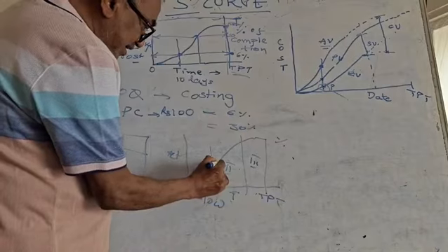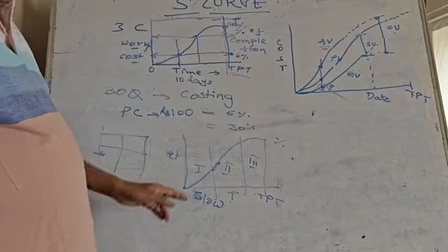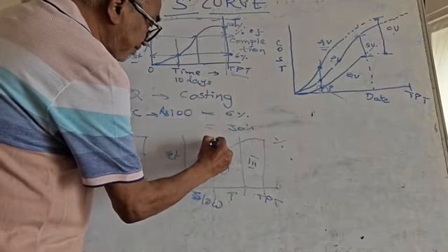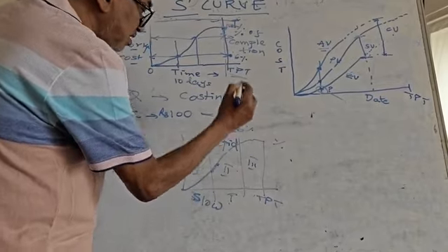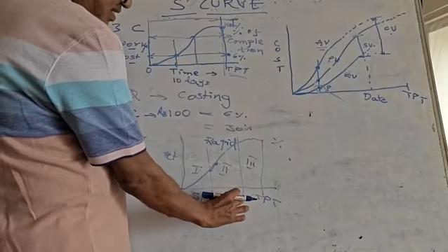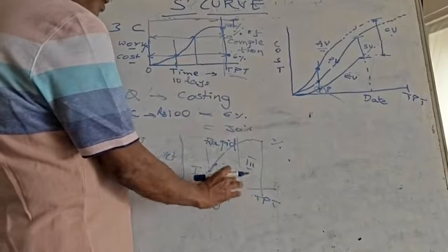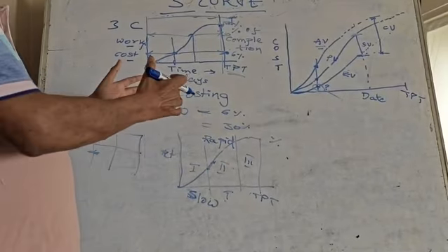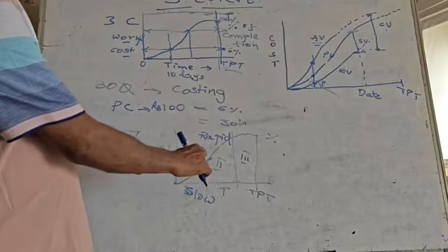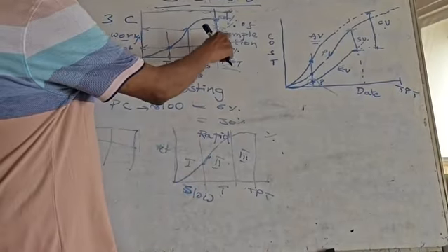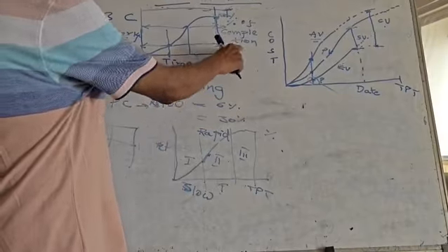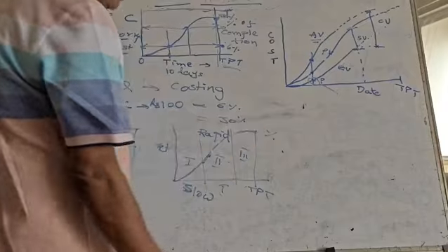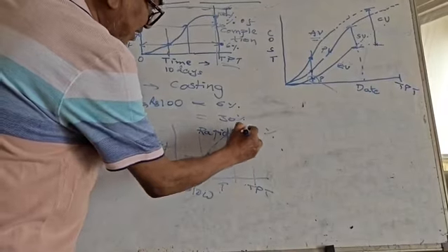From here it gains momentum. It goes on increasing now. So this we call a rapid phase. That means during this phase the project will be in full swing. All activities are going on well, and so many activities as per the bar chart and the network diagram are going on. Money is being released and you will accomplish the percentage completion of the project. Then again when it comes to the finishings and all that, it may again become a slow phase.